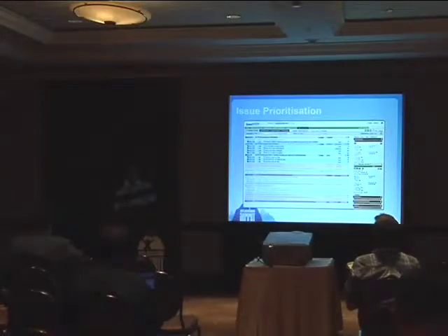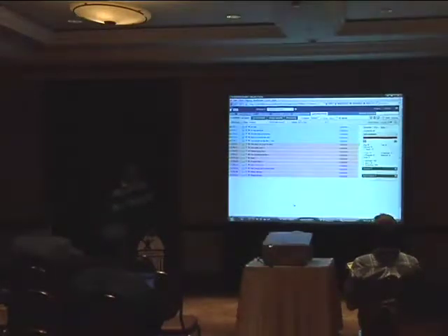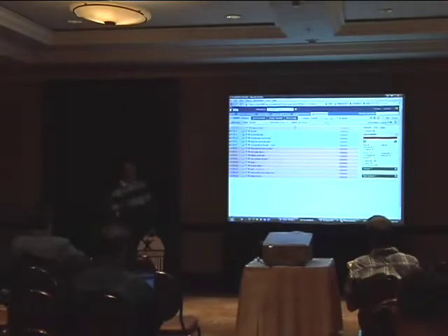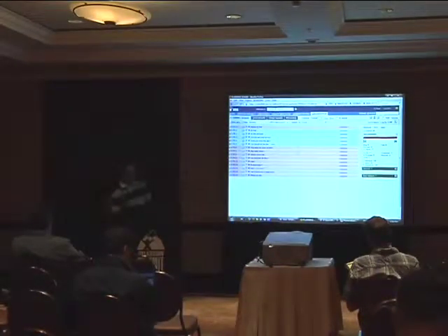So what we have done in GreenHopper is we have added what we call the ranking field that you can associate to your project. As soon as you sort your issues by that ranking field, you can actually grab your issues and re-rank them directly in the list. By drag and drop, you can bring them, and of course you can do some multi-selection.